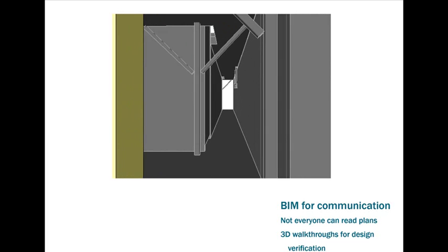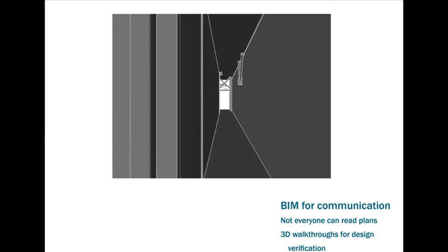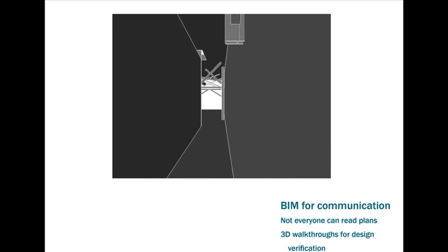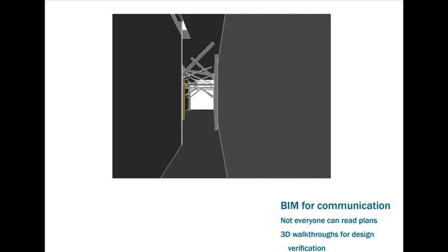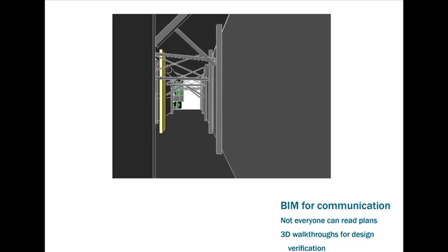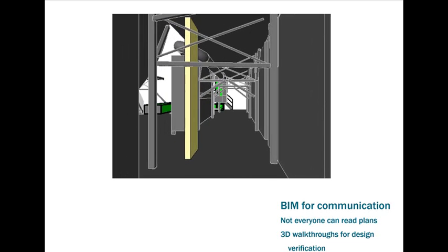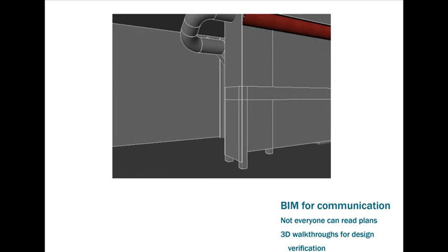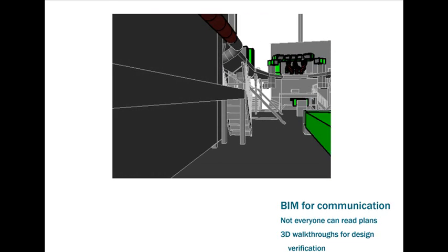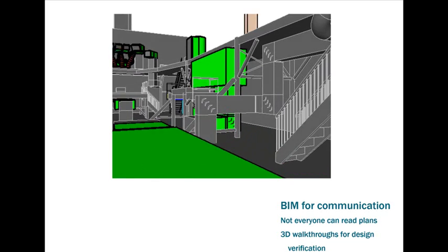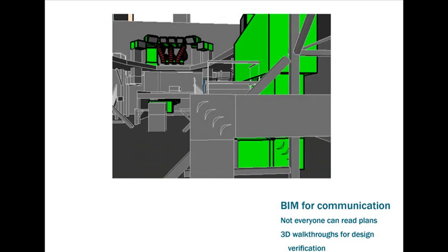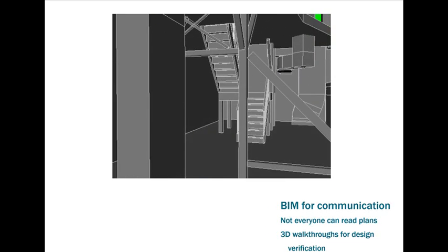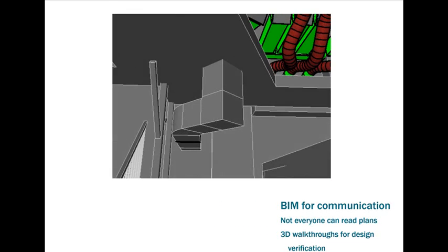And so what we did, this is just a video that we put together. We actually went up to Boeing in a conference room, hauled our laptop and our projector, and we sat in a room with 10, 20 people at times, and we just, what we called, flew through the model with the right people. We didn't create a video like this. This is really for the presentation, but we walked through like you can in Revit, and on the 13 projects, we probably avoided 100 different changes during construction.